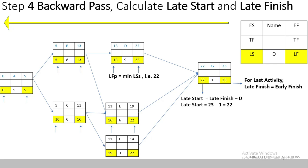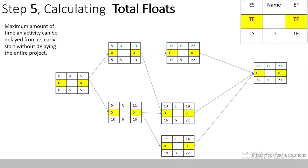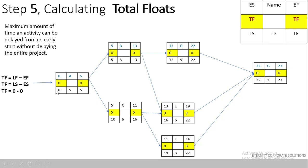In Step 5 we calculate the total float, sometimes also called slack. Total float is the maximum amount of time by which an activity can be delayed from its early start without delaying the entire project. The formula is: Total Float = Late Finish − Early Finish, or equivalently Late Start − Early Start. For Activity A, late start is 0 and early start is 0, so total float = 0. We apply this formula to all activities in the network.